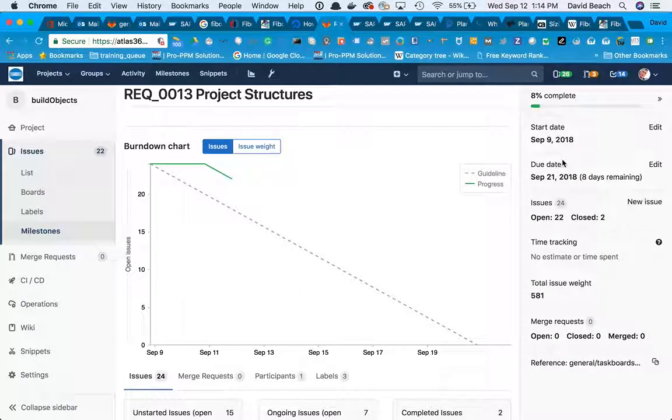Right now, this is kind of a guess, because we don't have enough information. Agile says, and I do want to stress this, that what you're not supposed to do is plan individual tasks, because in technology projects there are too many unknowns or parameters to know at any given time what the tasks are going to be. The tasks always change based off of certain events that happen, and so many things impact that you can never know the task list in an IT project.